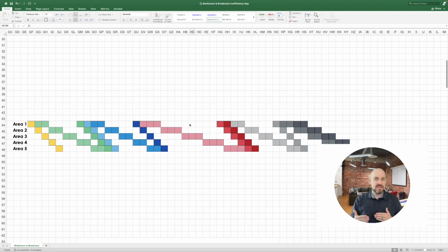At best, with the current tools that we're using, we can get what is called resource efficiency. That's what happens here in this image. As we are focused on each individual trade, we don't want them to ever stop, and so we want to make sure they're efficient. That resource becomes super efficient. The thing is, we have lots of gaps in there, and so our workflow is not good. So how do we combat this?